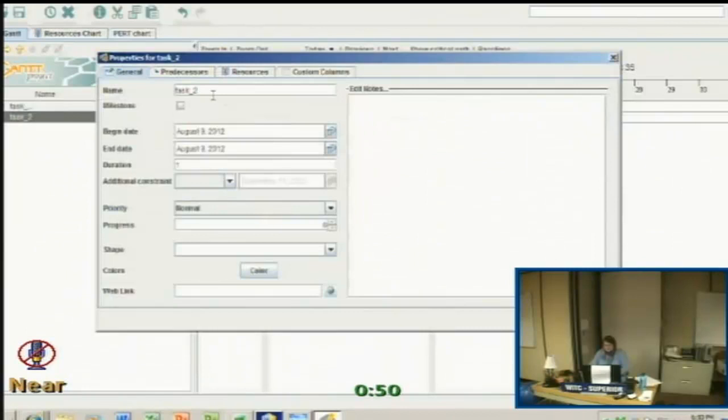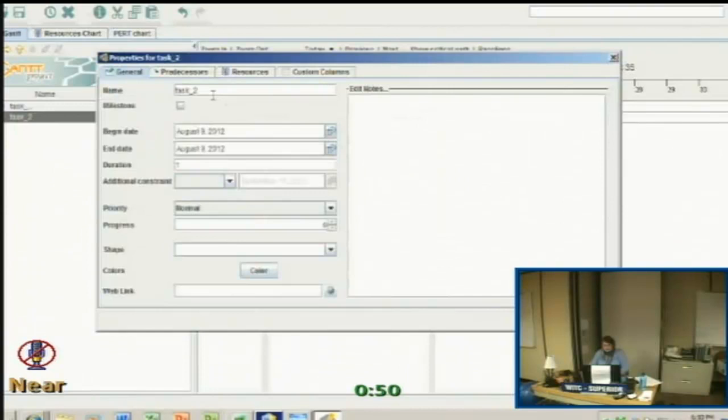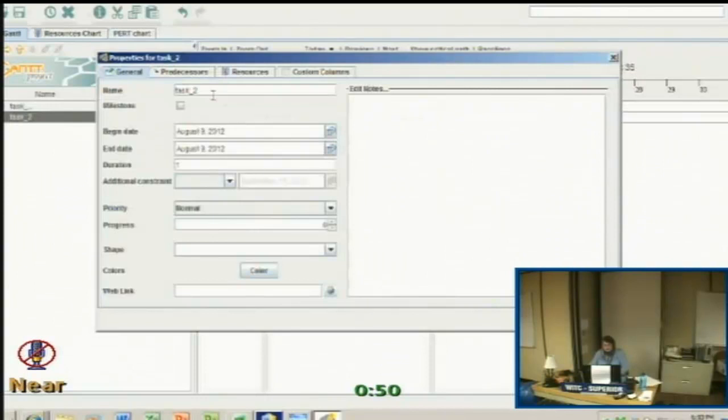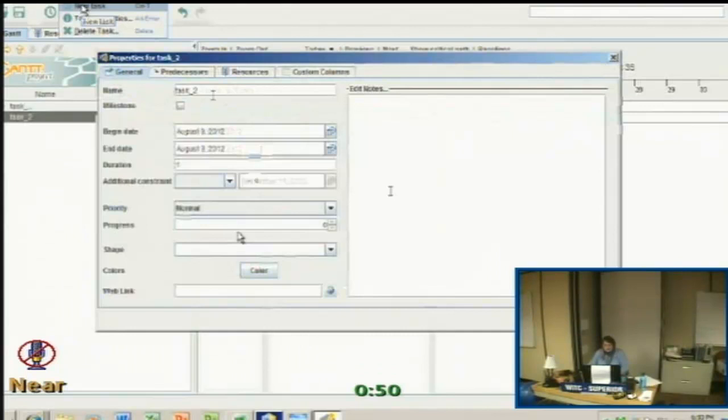And I'm going to say this is going to begin on September 21st. And we want to have this done within a week by September 28th. This is going to be a high priority item. So on my calendar I can view it nice and clearly. I'm going to give this a blue color. And I'm going to put in charge of this John Smith. He's the accountant. I don't know why I'd put him in charge of it. But I don't think we added the IT guy. I'm going to add another task.